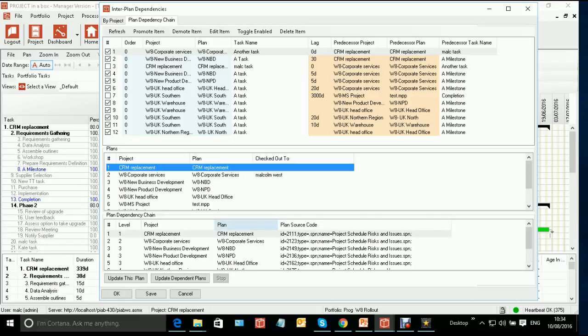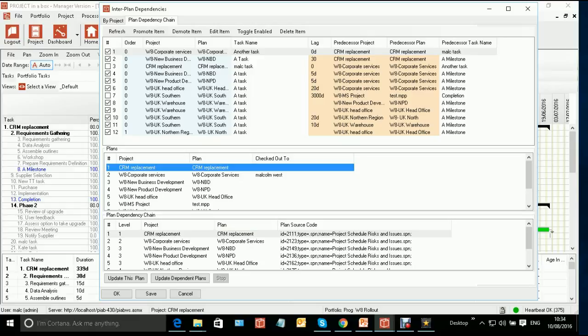Now, if we check out that plan, make a change to it, check it back in, it would automatically then say, oh, I now need to do this next one. And it will then check that file out and check it back in again with the updated changes, building in that extra dependency change that's happened.